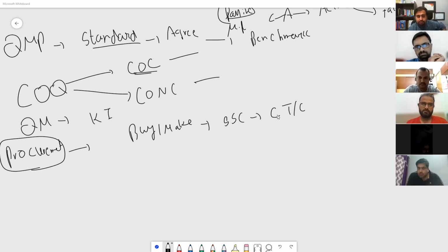Okay, so once we have decided which type of contract we do, we basically send the bidding document outside, and we make procurement strategy, how we are going to decide the bidders. We make procurement management plan, we decide procurement phases. We also get independent estimate. You see, sometimes what happens, the customers have monopoly. If there's only one person, they can make a monopoly of that thing. So you need an independent estimate to check what is the actual cost of this thing. So that's the entire thing about procurement in the planning phase.